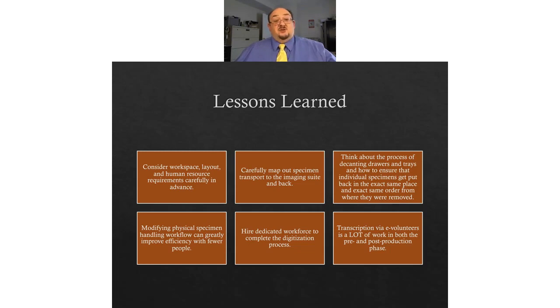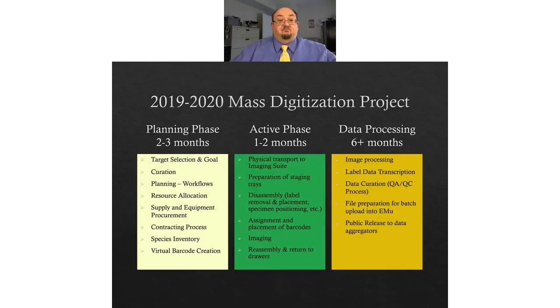We understood that we needed to modify the physical specimen handling workflow because there were too many people and we were experiencing burnout in some of this. So we needed a dedicated workforce to do it. And in this case, the transcription via e-volunteers, it's a lot of work for our data managers, both before and after, because you have to plan out the fields that you want to use. And then you have to make sure that the transcriptions are accurate. And so there's a lot of work on the data side, even after you have the digital images taken.